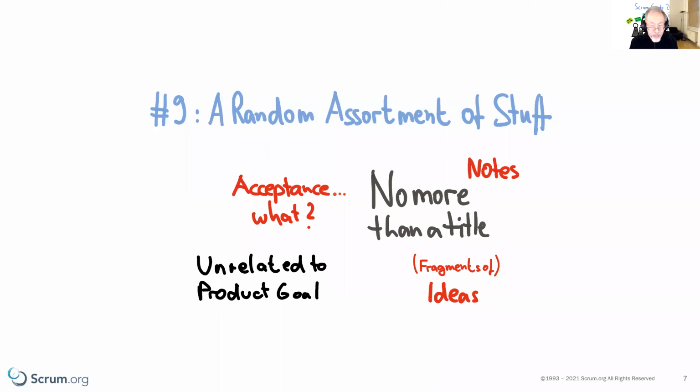And the pro tip, check out who is creating this stuff. Probably you will find out that stakeholders who have access to the product backlog, I assume that you use the software, are probably creating those backlog items as well. I would strictly reconsider providing stakeholders with writing access to your product backlog. That is causing more trouble than it is creating a better relationship with them.